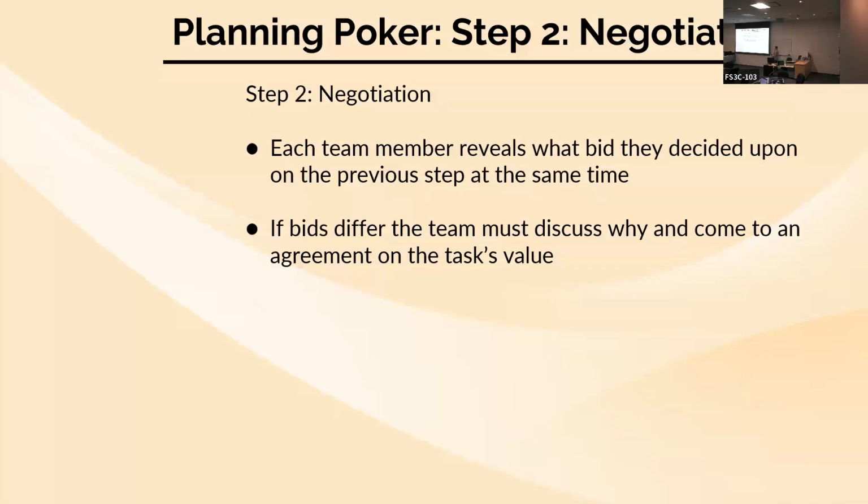And at that point, the bid goes to whoever you're giving the user story to. Because if it's still that person that needs to do the death animation, we would need to put a 5 on it, because that's how long it's going to take that person to get it done. It wouldn't make any sense for me to put my bid on and say, oh, I can get it done in a half hour. That doesn't mean you should be able to get it done in a half hour as well. That's not accurate. That's not true. That's not the reality of it.